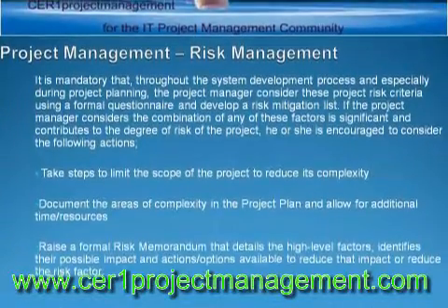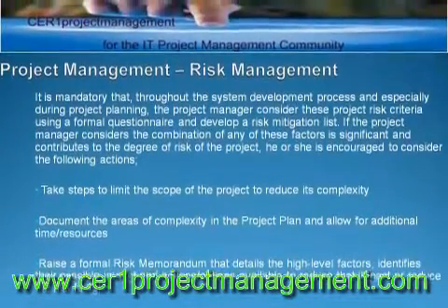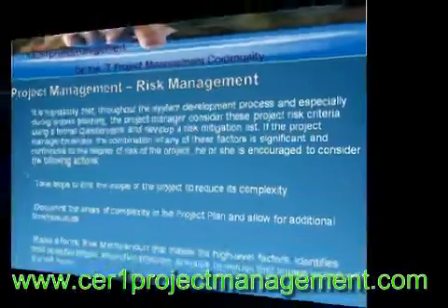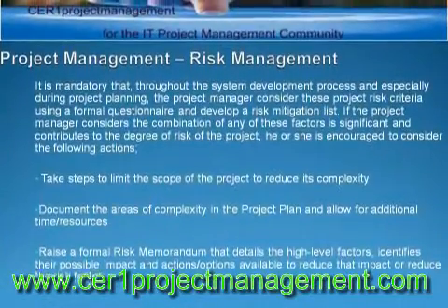During the project planning process, the risk assessment, which is normally completed during the development of the business case, is reviewed and updated by the project team. Risk assessment is a formalized subjective assessment of the probability of project success.